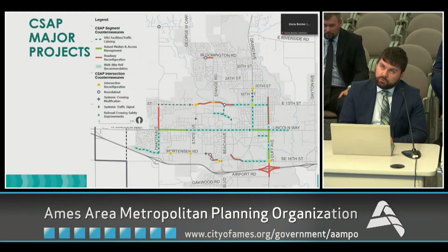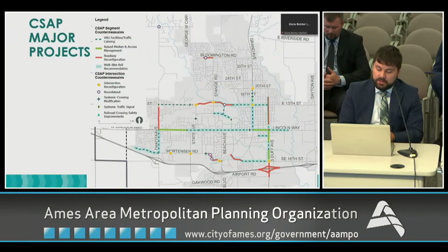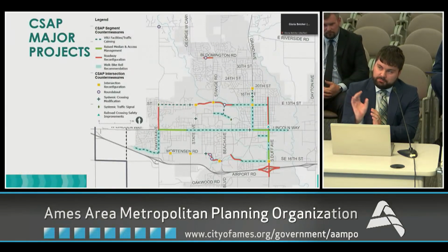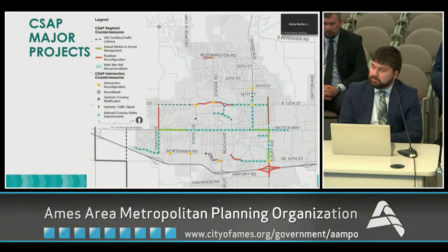I believe our plan forecasts a 2% annual budget increase and cost increases of about 4%. So about a 2% annual increase in funding after the next 4 years. I believe for the next 4 years it's flat. And then after that, it's around 2% annual growth projections for those federal dollars being projected through 2050. Those are bucketed into short-term, mid-term, and long-term as far as how the projects are shown. I think that'll make more sense when we get to that project map. We also have tables in the packet that we can pull up that would maybe clear that up a little bit.